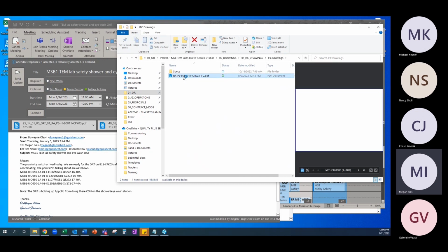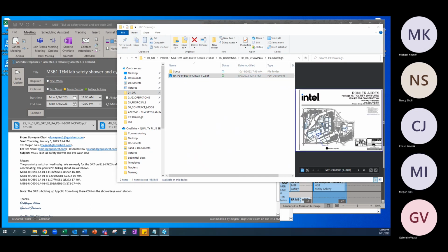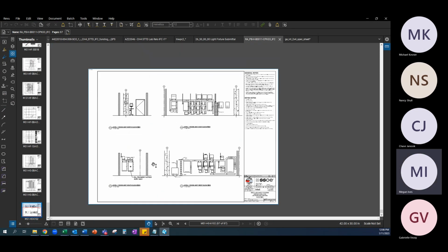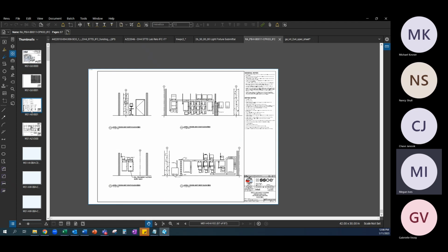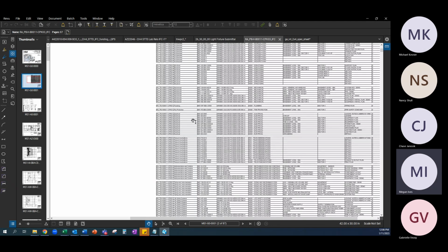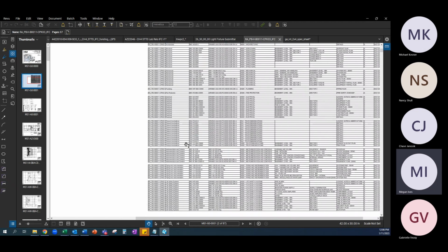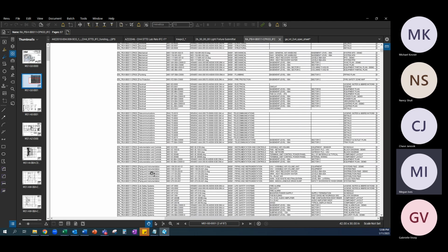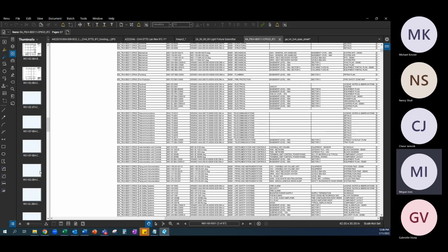So under the IFC drawing set, a couple things we're going to need is the location drawings, which is going to be the device locations, which are going to be in INC. The other thing that we're going to need to provide him is the P and ID drawings. So it looks like they did provide us with P and IDs. That's great. And they're right next to the INC drawings. So I'm going to go down